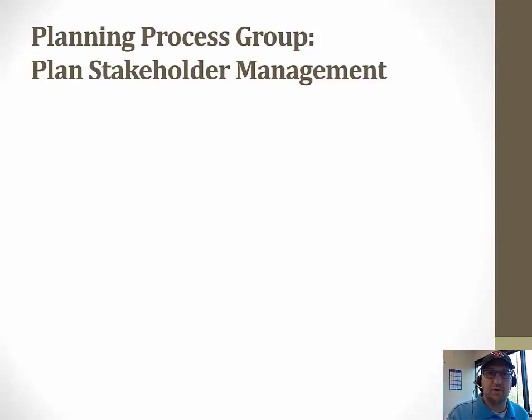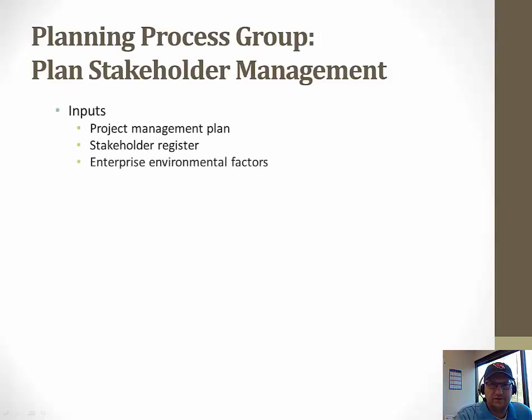So stakeholder management is more than improving communications, it's more than managing a team. Okay? And it's also about creation and maintenance of relationships between the project team and the project stakeholders. So, and the aim here really is to satisfy stakeholders' needs and requirements, but within the project's scope, budget, schedule, and the triple constraints. So this process generates the stakeholder register, and the Stakeholder Management Plan, and that really contains detailed plans for effective stakeholder management.